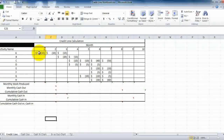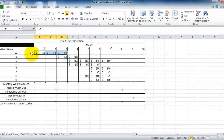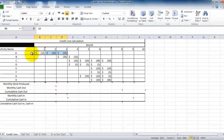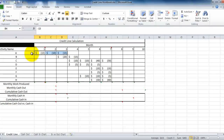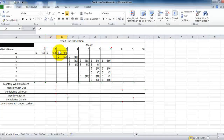These three columns represent how much work is going to be put in place for activity A for this total project. For the purpose of our exercise today, let's assume these numbers are in terms of thousands. So in this particular case, activity A is going to incur a cost of $15,000 the first month, $10,000 the second month, and again $15,000 in the third month.